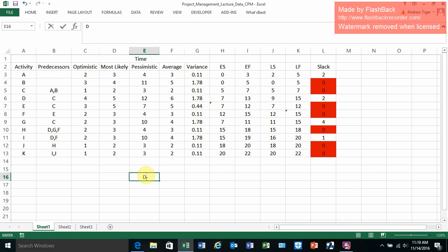If I have a due date, let's say, and my project is going to finish when? It's going to finish at the end of the last activity, which is in 22 time periods. So if my due date is 23, what is my probability of meeting my due date? Which is probably a tighter way to represent is the probability that my random variable, which represents how long my project is going to take, is less than or equal to my due date.